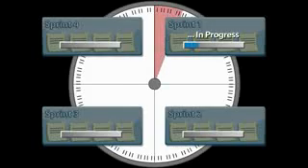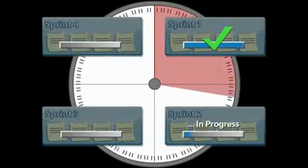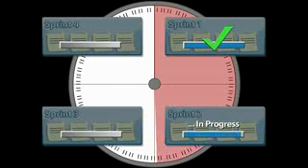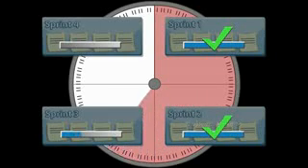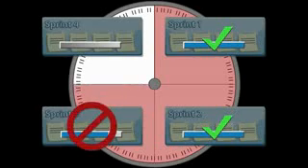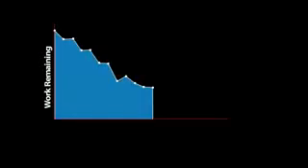One of the most important things to remember about sprints is that the goal of each sprint is to get a subset of the product backlog to a ship-ready state. So at the end of each sprint, you should have a fully tested product with all the features of that sprint 100% complete. Since sprints are a very short but realistic representation of part of the product, a late finish of a sprint is a great indicator that the project is not on schedule and something needs to be done. Therefore, it's extremely important to monitor the progress of each sprint with a burn-down chart.